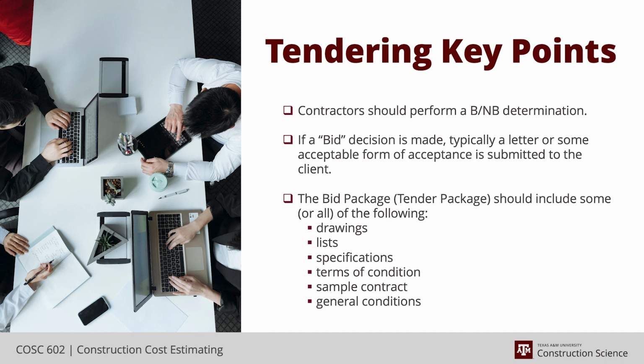At FEL 3, now we're expecting a more finalized plot plan, maybe some conceptual elevations. We should have P&IDs in addition to the PFDs, and maybe some more focused equipment arrangements. But still, there are no isometrics. There are no concrete plans. There's no elevation plans on the pipe rack or exterior structures, open structures at that point, because that will all be developed during FEL 4 in detailed design.